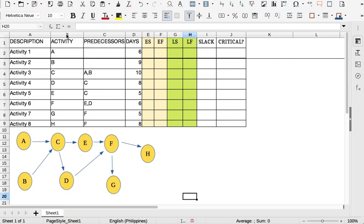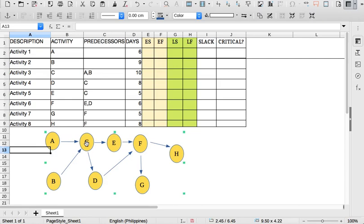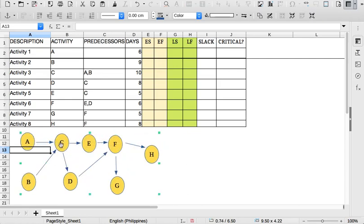First, on column B we have the activity codes. We have at least 8 activities from A to H. In column C we have the predecessors, and in column D the days in which this activity needs to be done. As you can see in the network chart below, the precedence of C is A and B — we need to finish task A and task B in order to start task C, and we need to finish task C before going to task E. That is how it is until we finish the project by implementing task G and task H.